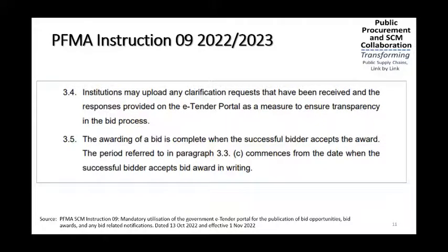May upload. So now, usually it happens when there's a briefing session. After a briefing session, people will still ask questions, and any responses that are given, that information can be loaded on the eTender portal. But now there's a "may upload", so I guess it will only be at the discretion of the institution. The awarding of a bid is complete when a successful bidder accepts the award. The period referred to in paragraph 33C commences from the date when the successful bidder accepts the bid in writing.